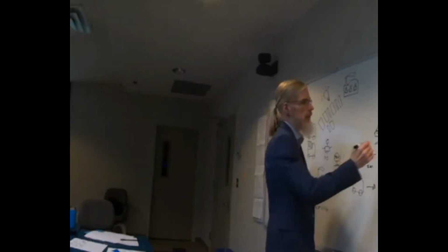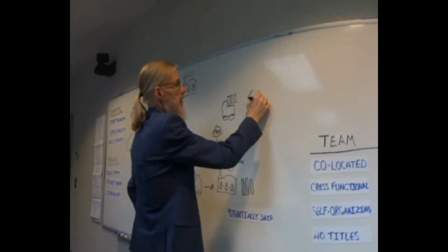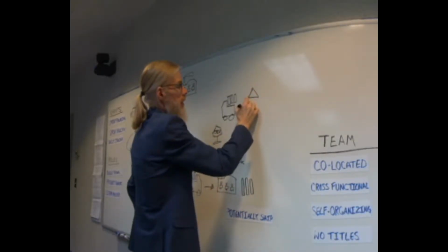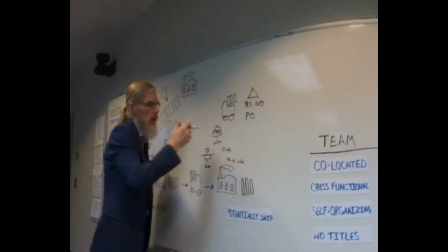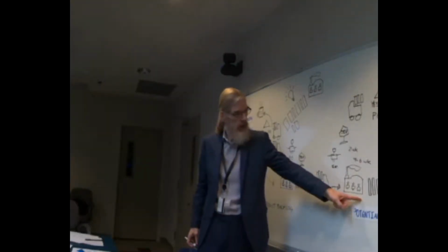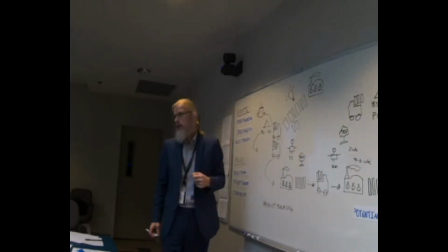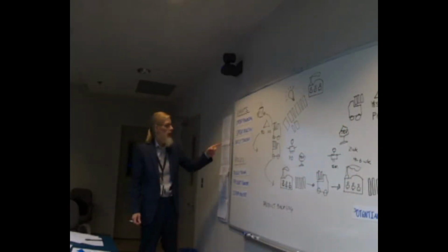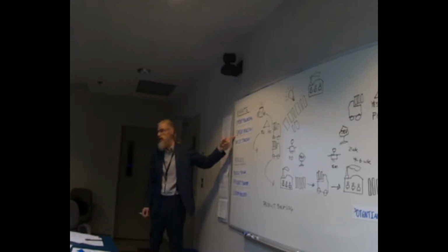is. It's owned by the PO, the product owner, and the product owner again will make a decision, yes or no. And the decision here is, should we accept the output of this build team and deliver it to the stakeholders? Okay? That is part of the sprint review, or this is also called the sprint demo. Does anybody have any experience with a sprint demo?